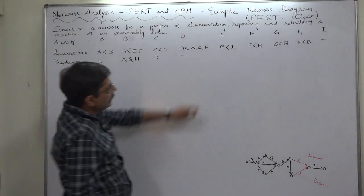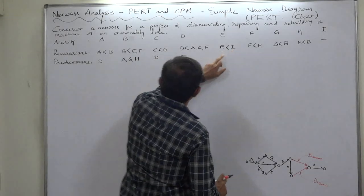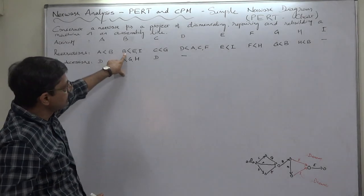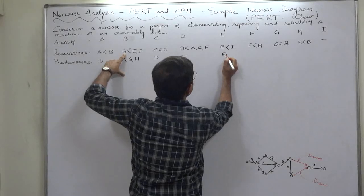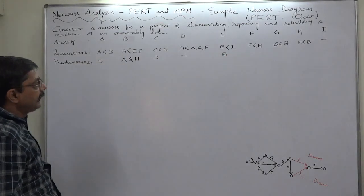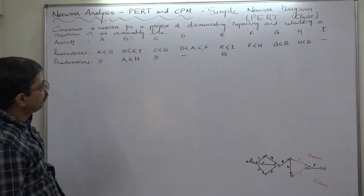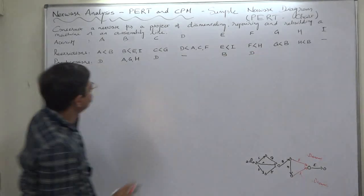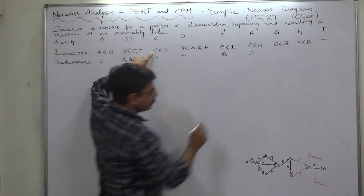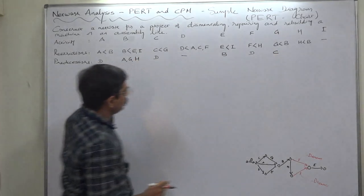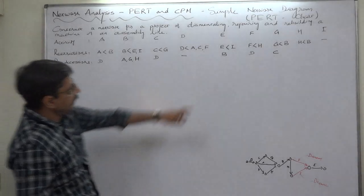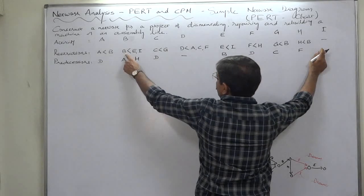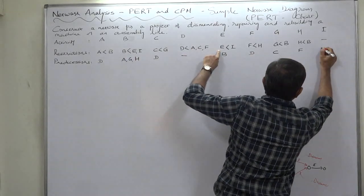E: B is predecessor of E. Then F: which one is predecessor of F? D is the predecessor of F. G: C is the predecessor of G. H: F is the predecessor of H. I: B and E both are predecessors of I.